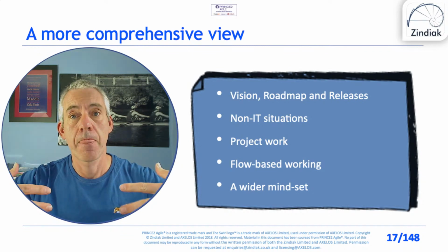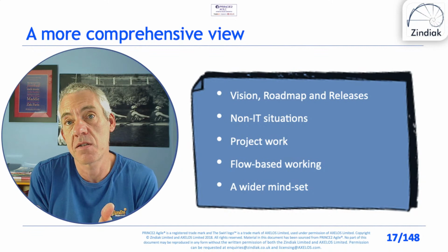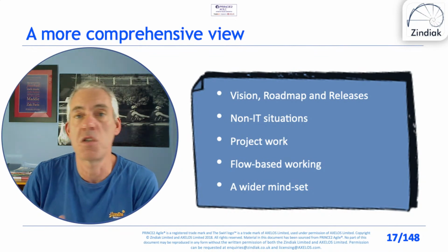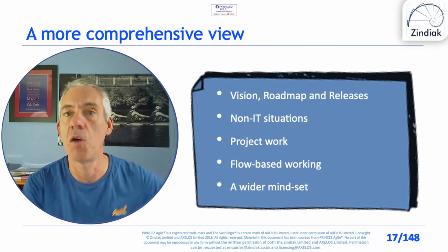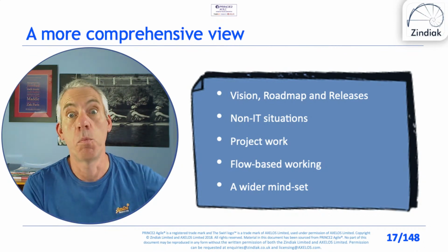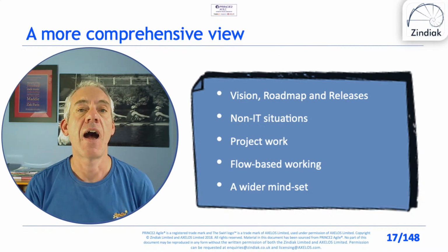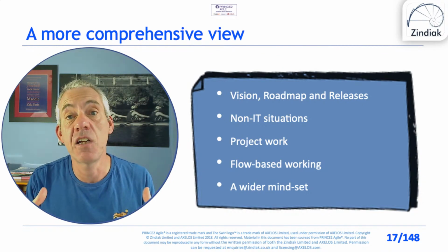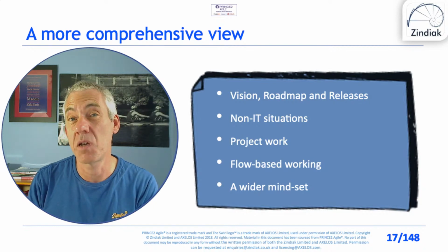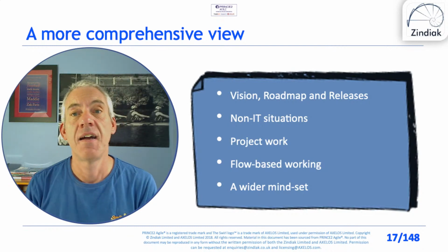In strict Agile, we're just saying, this is what we're doing in the next sprint, and in any future sprints, we haven't decided yet. We've got a prioritized product backlog, so you can make your own judgments, but the whole point is they can change, and therefore the future sprints will change. In a new Agile situation, you might need to be quite strict about that and give people less roadmap and releases.